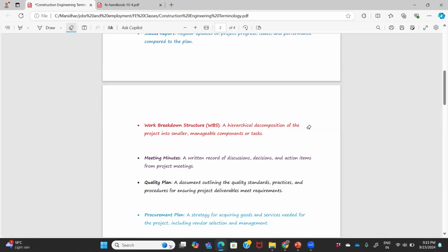Concrete may involve reinforcement as well. On top of concrete, you have to do some acrylic painting too. So though the overall target is to build a playground, that work has to be broken down into all these steps, and a contractor has to decide for each activity how many days he has to arrange and how he has to do it. So that's the concept of work breakdown structure.